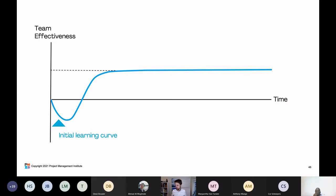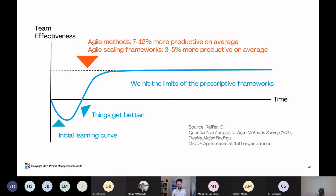Here's an example of what it looks like when we're adopting a new way of working: there's an initial learning curve where our effectiveness dips a little, then things start to get better, but then we stagnate and hit the limits of prescriptive frameworks. A study done in 2017 by Rifer found that using agile methods, we only see a 7% to 12% increase in productivity compared to teams not using agile. Looking at agile scaling frameworks such as SAFe, we only see a 3% to 5% increase — pretty bleak numbers.